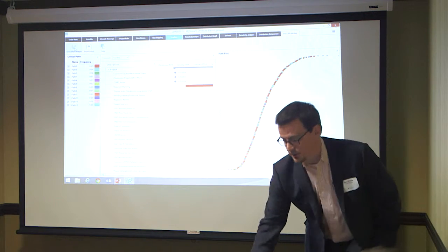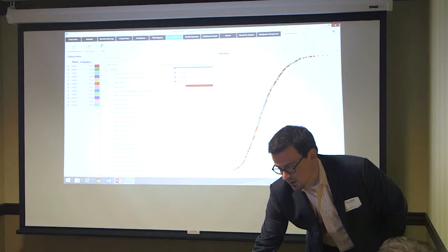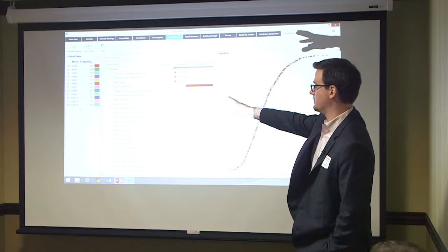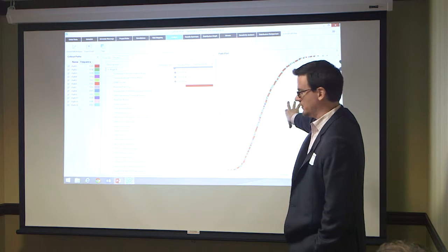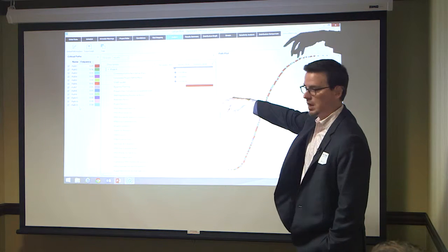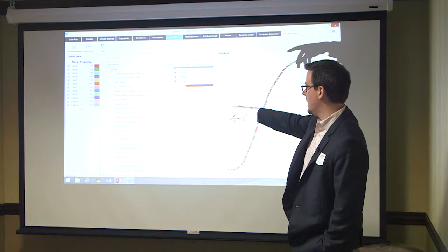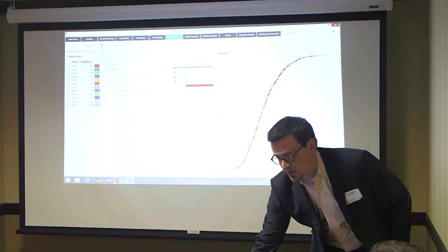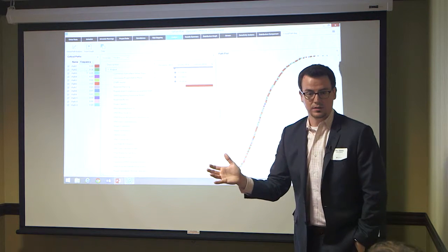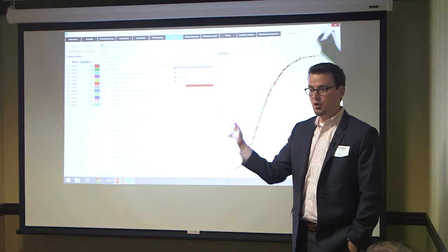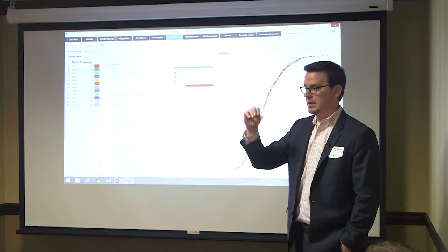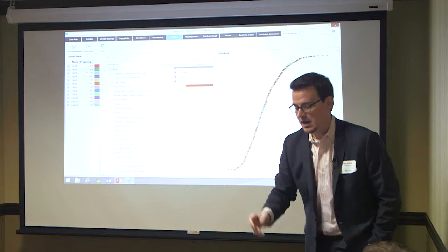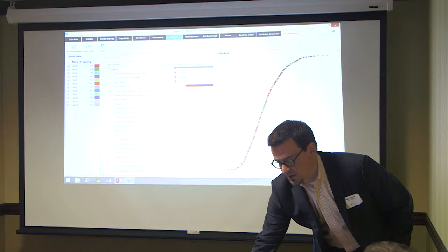So what we're seeing here is, while there's a lot of different critical paths, some of them happen very fractionally. We actually trace it out to a lower level of detail than we roll up. We round to the nearest 2 decimals here. So we can see that there really become 2 major critical paths with all of those risks included, right? But this will change as I go back and change which risks are included or not, and I can track how my critical path changes over time, based on which risk I include. So to the point of being able to say, what are my different critical paths?